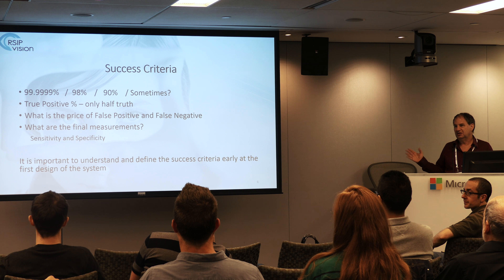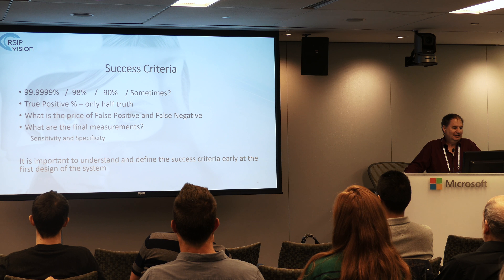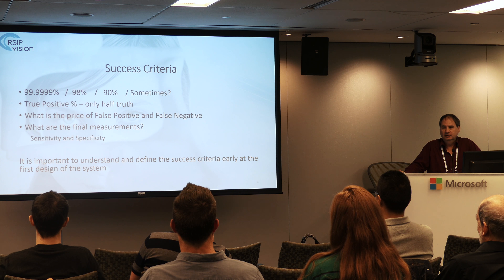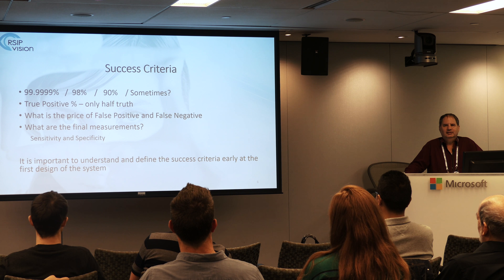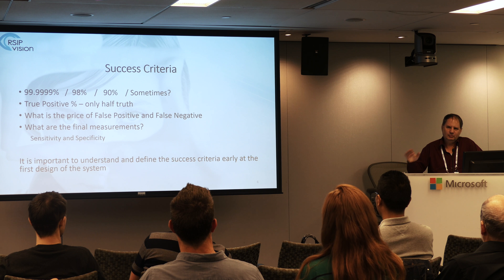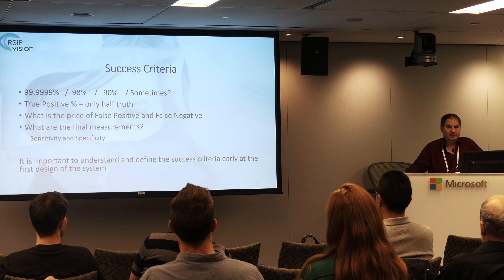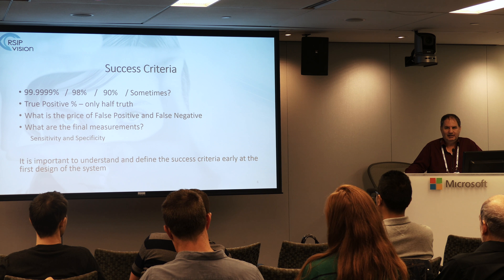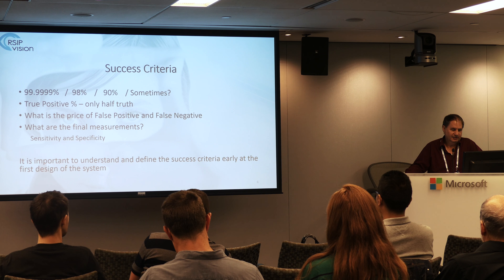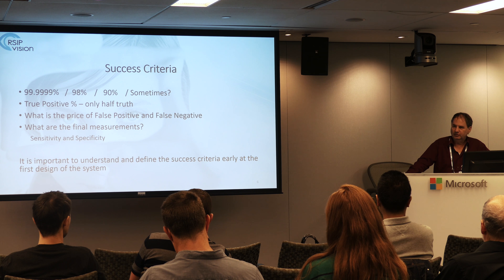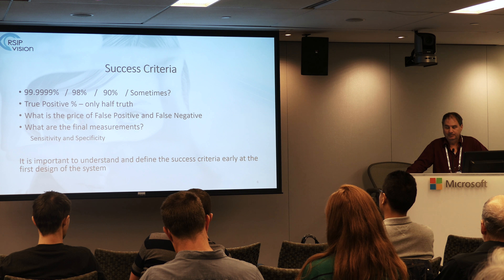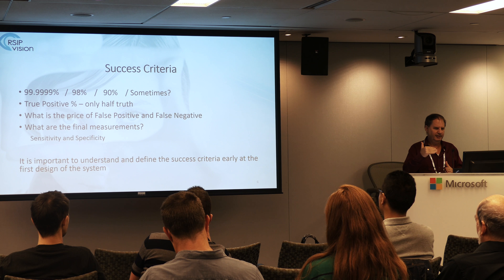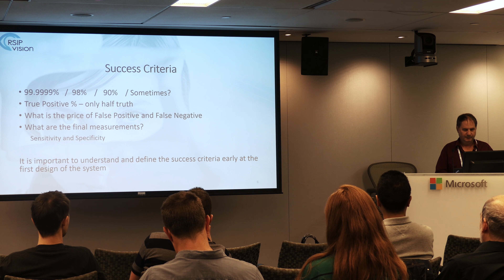Starting with measurement of success: you can ask for 99.9999% or 98% or 90%, but the true positive is only half of the picture. The number has to include other aspects — what is the false positive rate, what is the false negative rate, what is the price of each of these categories, and how we are going to measure it: by true positive/false positive metrics or by sensitivity and specificity. It is important to define the success criteria early in the first design of the system.